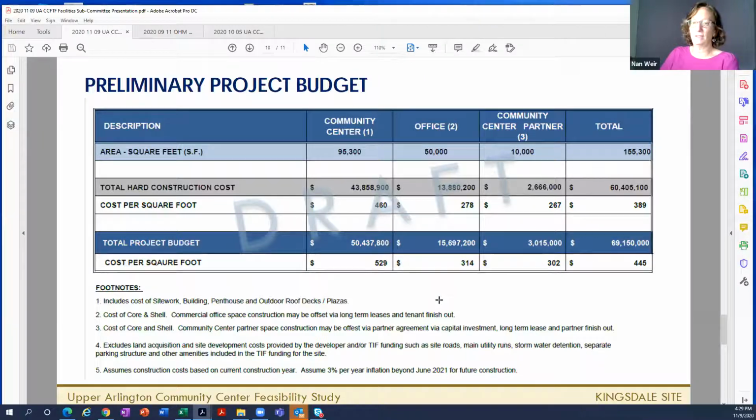And our hope is really that these might still come down a little bit. We're still carrying some pretty conservative contingency numbers, both in terms of construction and design. And we're hopeful that as this comes together, we could sharpen the pencil, and as long as there weren't any really intense inflationary aspects, that these numbers would be on target.